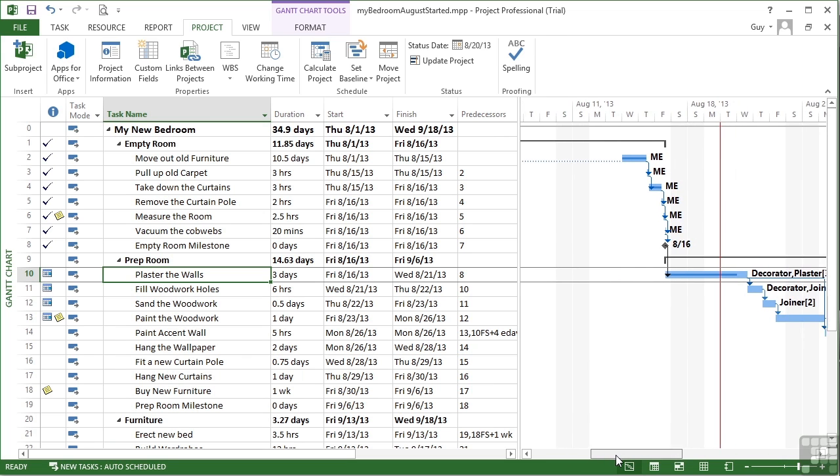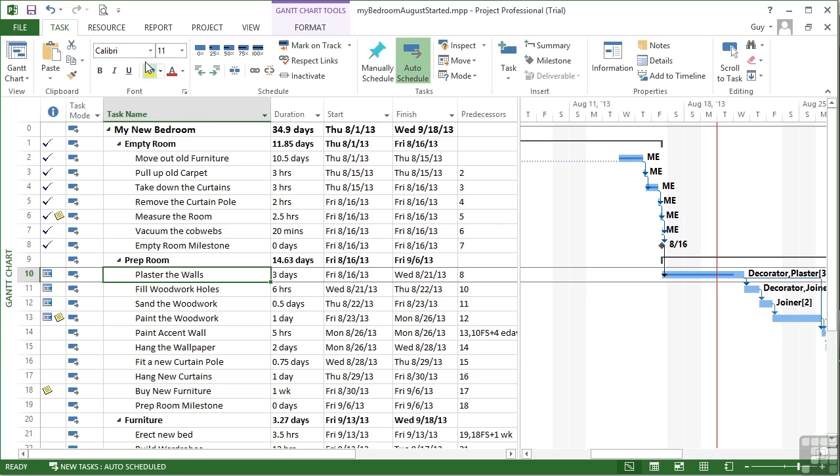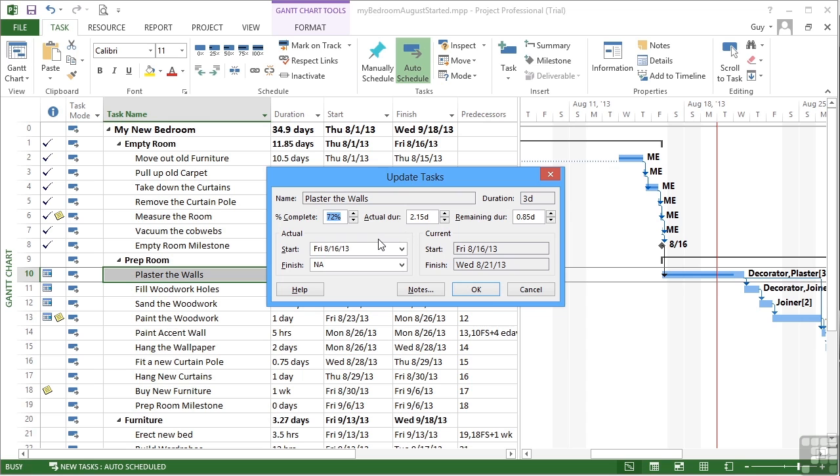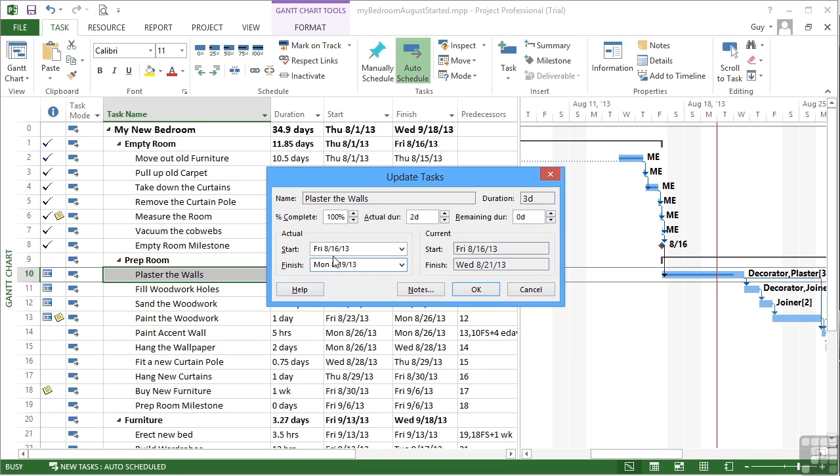Now, if it so happens that one of our tasks was actually done faster, it might happen. So far we've only been delayed. Plaster the walls is meant to take three days. If we go to the task ribbon and come down to update tasks, this is the easiest one to work on because we can see all the variables. I want to make it 100% complete, but instead of it being done in three days, I'm going to say we did it in two and the remaining is none. So we actually finished on the 18th, which is a Sunday, so we must finish on the Monday. So that's the whole of Friday and finish on Monday.